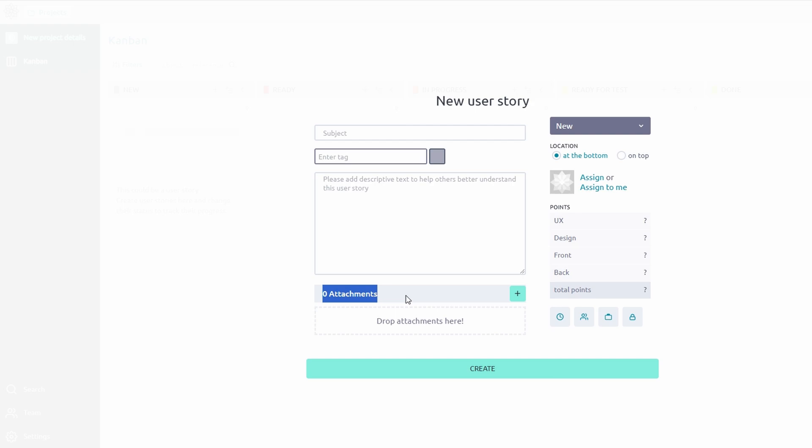Assign the task to a team member, set a deadline, and even add points for effort estimation. This makes it easier to track progress and ensure accountability. With Taiga's intuitive interface, managing tasks becomes seamless and keeps your team on track.